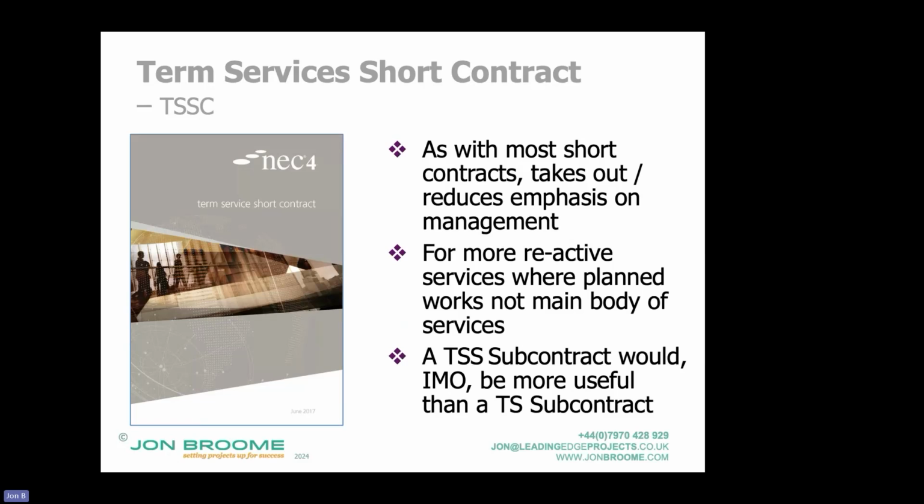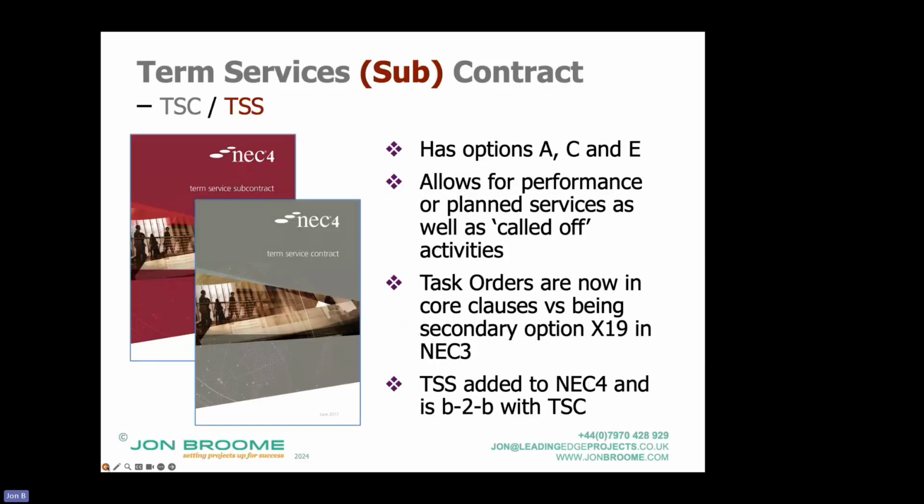Now, this, in my opinion, takes out a lot of the low risk or the complexity, but there is a nuance. These ones have the full planning requirements, because you don't have an accepted program in the term services contract, you have an accepted plan. So planning rather than programming requirements, which is fine if you say once a year, I want you to do this, or a performance spec, and I want to know when you're going to do it to give me that comfort when I need to vacate this room or whatever, because you're going to maintain the lifts in it or whatever it is. Yeah.